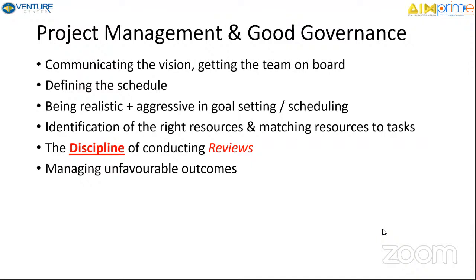And the entire group has to own the fact that tasks which were supposed to happen, are they happening? Are they not happening? Are there obstacles, not only on the tasks which were supposed to finish last week, but more importantly, you have to start anticipating. You have to start surfacing risks of tasks getting delayed for those things that have to happen in the next 7 days, next 15 days, next 20 days. So that's the horizon which you have to look at. Every time you meet, the horizon you see is last 7 days and next 15 to 20 days. That's the horizon that you look at.